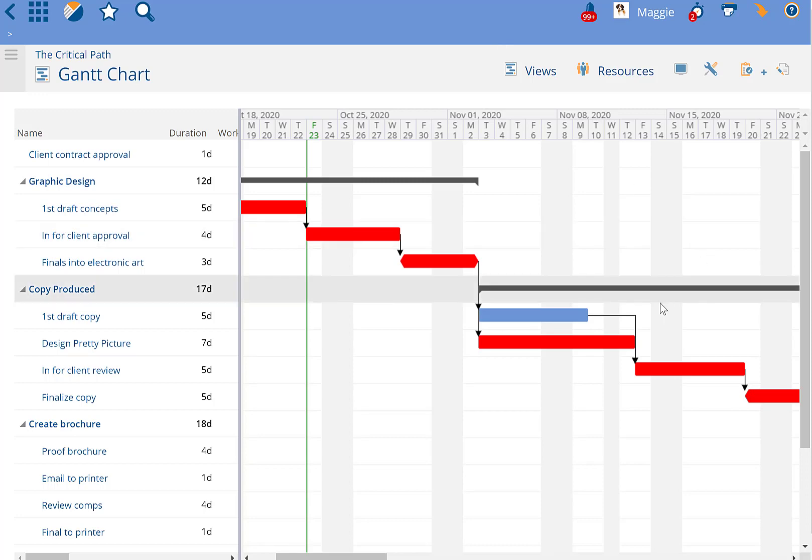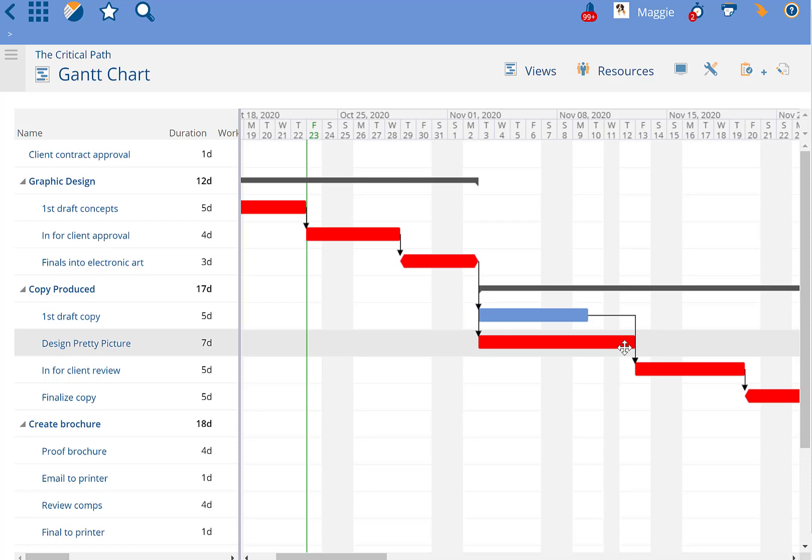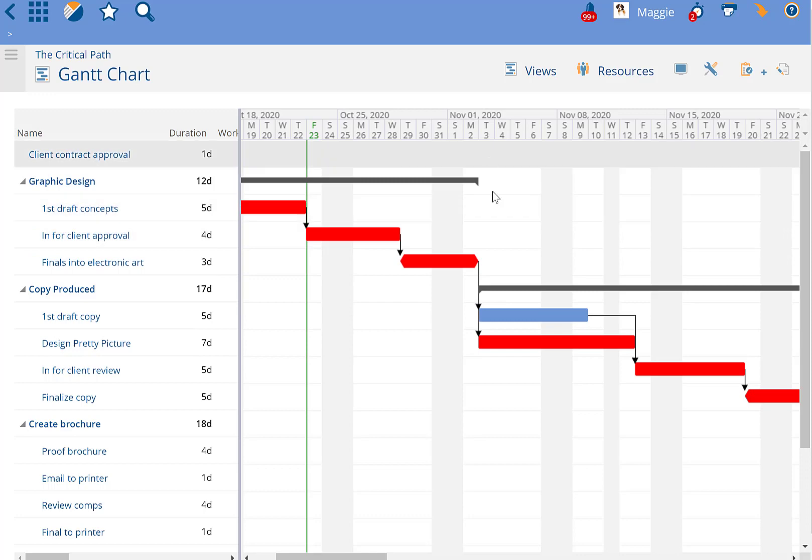Therefore, if this task now becomes the one that's pushing the entire project plan out and affecting the project end date, this Design Pretty Picture task is on the critical path, and first draft copy is no longer on the critical path.